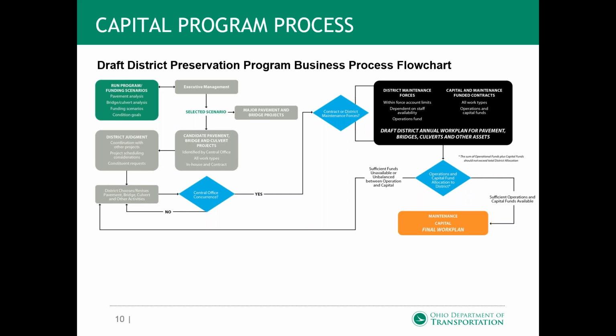So once we establish those goals, we're then doling that down to the districts, and we're saying we need you to deliver. We're asking them to deliver 75% of what comes out of this process, with a 25% flexibility that allows them to do some things a little bit different. And then we have a compliancy portion, very similar to what Karen was talking about, where they're actually going back and forth with us in terms of what they want to do, and then we're measuring them on how compliant they are with what's coming out of the system, okay?